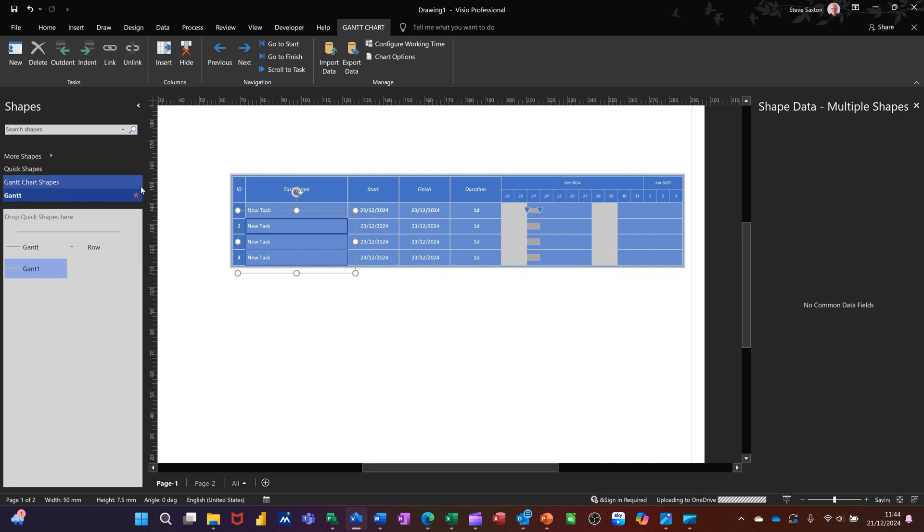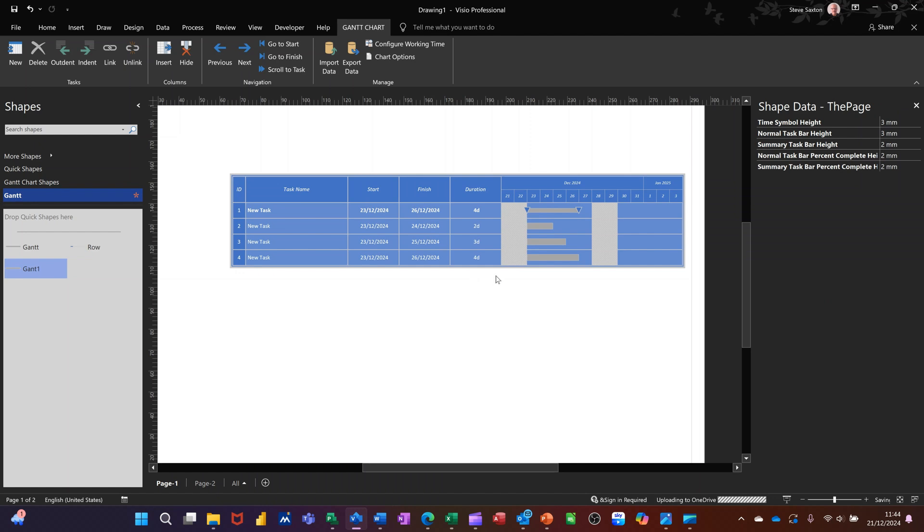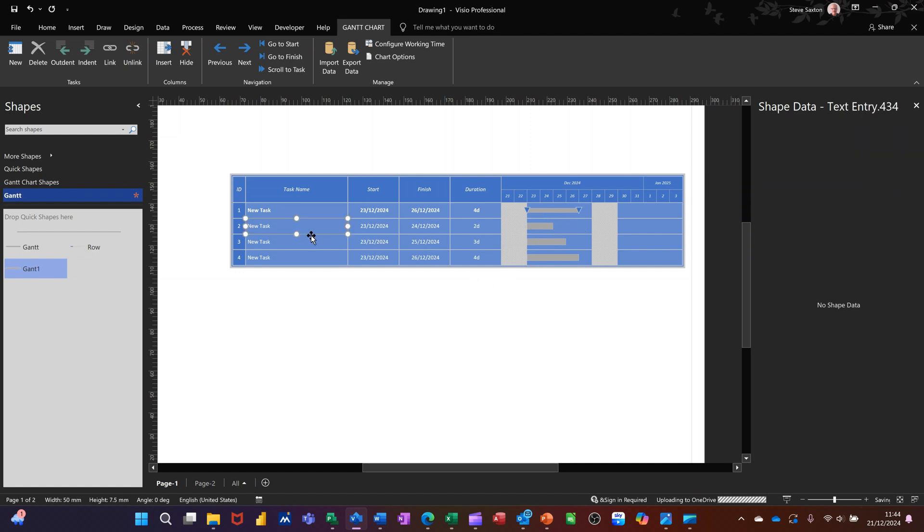And they all become part of this top one, so the top one would be a review. And if I change the durations, I put two days there, three days there, five days there or four days there, you see how that's expanding. If I click on them again, hold my shift key down one at a time, I can also link them.